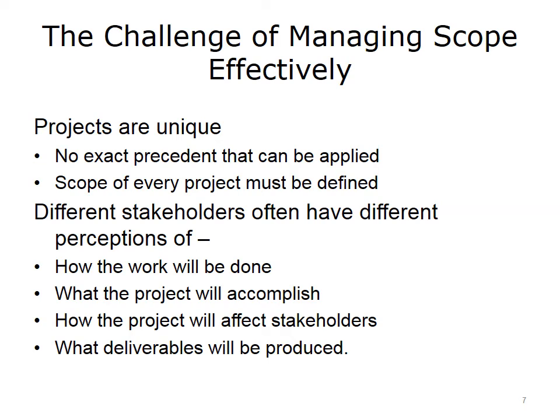For stakeholders who come to the project late, it is important to discuss with them what has already happened in the project, what your scope statement is, and how their request for changes will change the project. It could increase the budget, the time, and possibly even the project itself into something totally different than what was outlined in your scope statement.